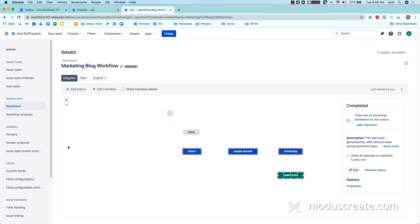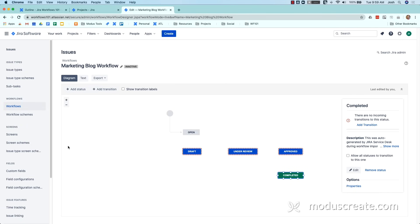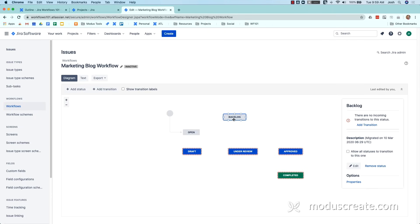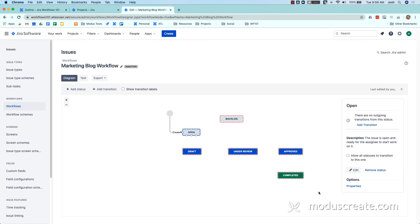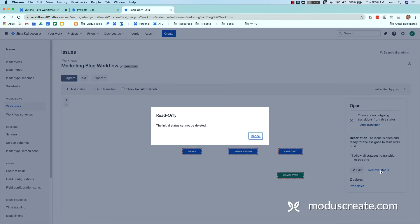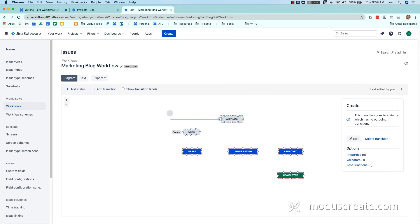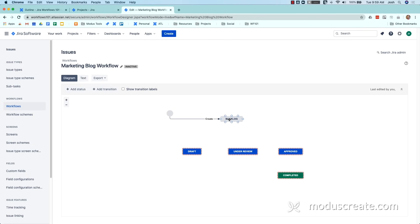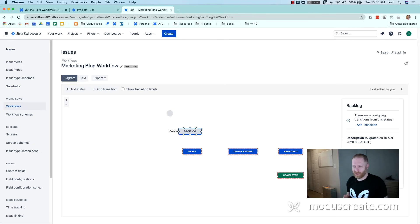To fill out the rest of the workflow, these status points are the basic building blocks — they represent where an issue can be at any point in the process. There's one more change I want to make: the 'open' status where an issue is first created doesn't really fit for this workflow. Because the team will be processing a backlog of ideas for blog articles, we want the initial status to be 'backlog' to be clearer. The only problem is I can't get rid of open because it's associated with the initial transition. So to fix this, I change the create transition, which then allows me to get rid of that unwanted status — and that's a good segue to talking about transitions.